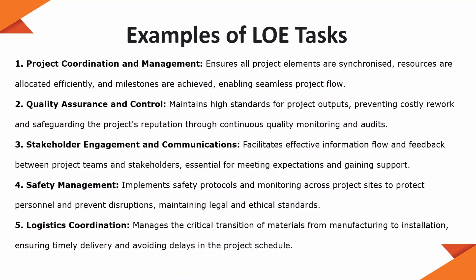Examples of level of effort tasks include: project coordination and management — ensuring all project elements are synchronized, resources are allocated efficiently, and milestones are achieved for a seamless project workflow. Another example is quality assurance and control — maintaining high standards of project output, preventing costly rework, and protecting the project's reputation through continuous quality monitoring and audits. You want to create a bar in your program representing the period where you need to apply quality assurance and quality control.